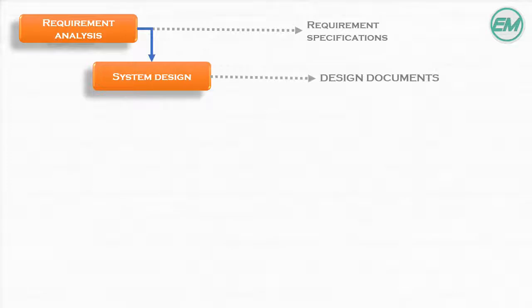The first step in the Waterfall model is requirement analysis. The requirements collected from customers are analyzed and a technical document is created as a baseline for creating the software. The requirements are classified as functional and non-functional requirements. This phase generates documents like the software requirement specification. These documents are reviewed and signed off, after which the project moves into the system design phase. A design team will create a blueprint for the software using the requirements documents and create design documents like the high-level design document and low-level design document. Again, all the artifacts are reviewed and signed off by a team of stakeholders and managers.